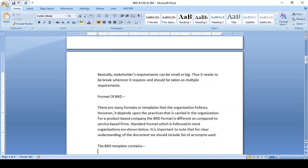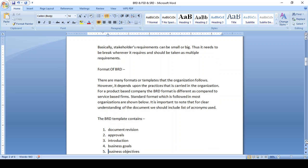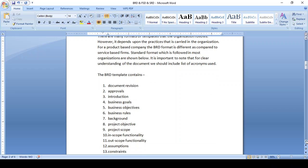The BRD template differs from company to company. Once you discuss with the client, you may revise the document multiple times as the client adds requirements. Only after the document is approved by the client does it proceed to the Functional Specification Document, SRS, or further development. The BRD introduction section should mention the project scope, business goals — what goals will be achieved — and business objectives, meaning the scope of the specific requirement.